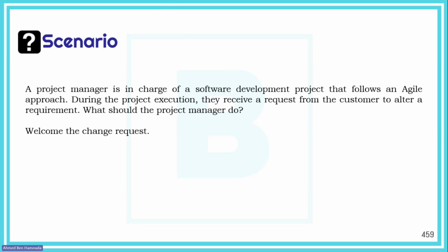what we mentioned earlier. In the review meeting, if the change will be implemented in the next iteration, then that's brought up at the end of the review meeting, and then that will be taken in detail in the planning meeting of the next iteration. Okay, so that's usually how changes are handled.